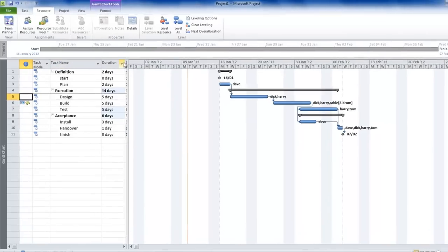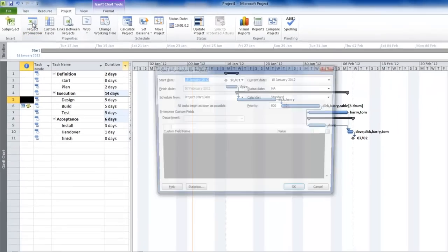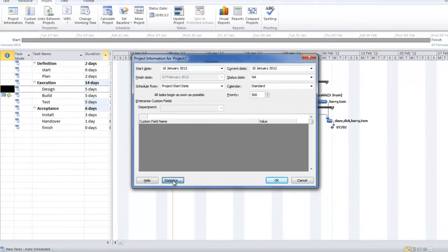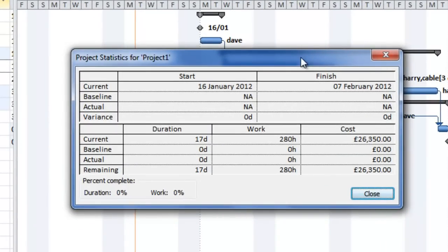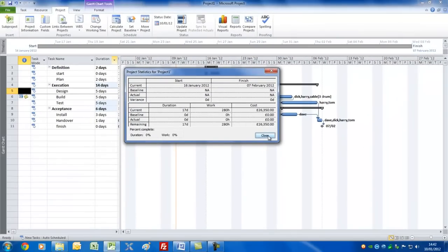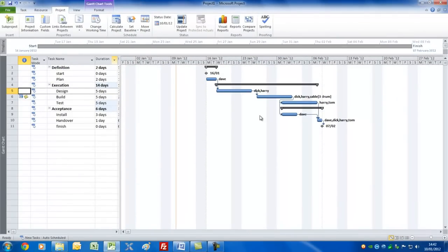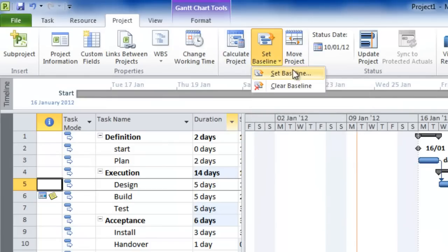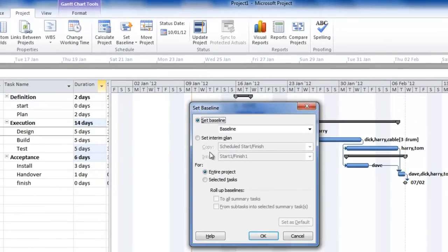Let's have a look at the big picture by clicking on Project, Project Information, and the Statistics field. We can see something of more value — we could show this to the project board, sponsor, or senior management, check they're okay with these dates, here's the work, here's the cost. If they're happy with that, we can get this approved and start working against this plan. If we click on this we can set the baseline — it gives a few options. I suggest you set the entire project and click OK.